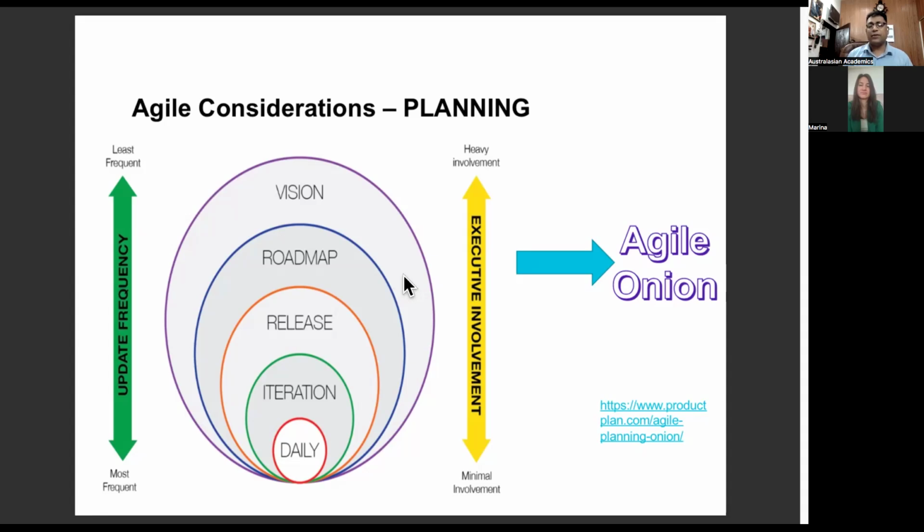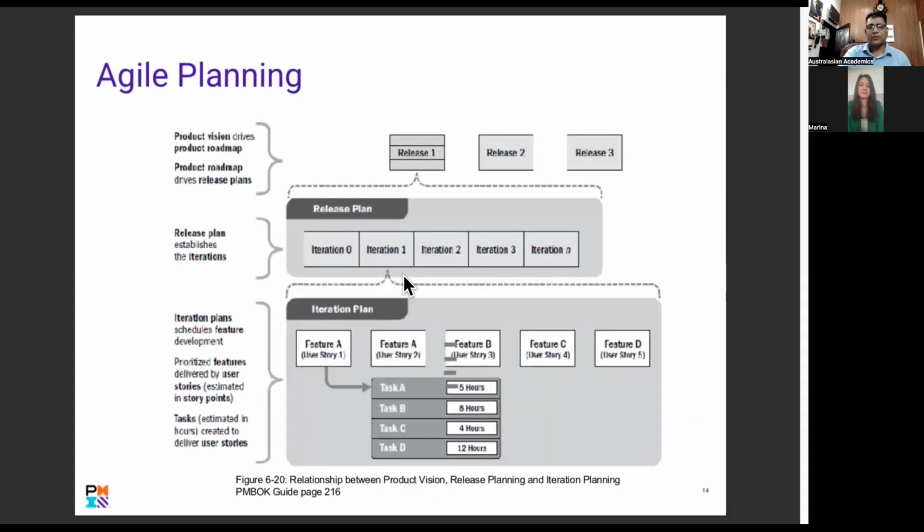Daily stand-up is very important, right? What we did yesterday, what we're doing today, are there any impediments? Are there any impediments to work with? And the next morning, we'll start again for 15 minutes, and we'll do the daily stand-up again. That's part of Agile. Agile planning, different releases.